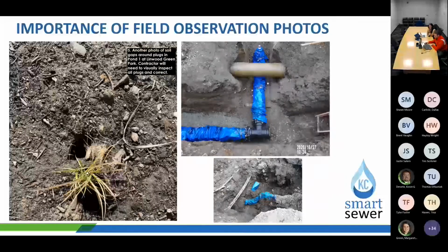They got a during-the-water-tie-in photo, and they have it timestamped, so it looks like at 10:24 they weren't going over that 4-hour minimum. If you start taking photos possibly between 9 and 1, which is normally when those water tie-ins happen, you would note then that they are over their time limit.